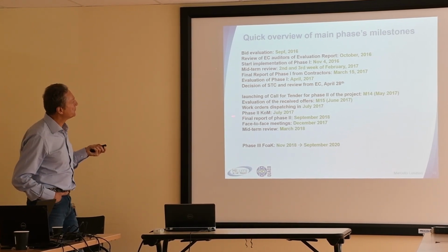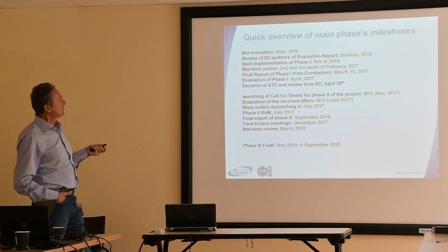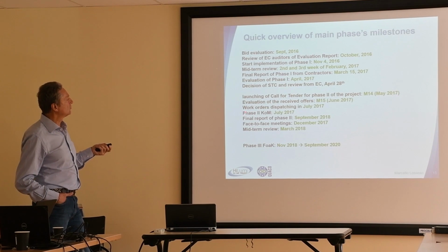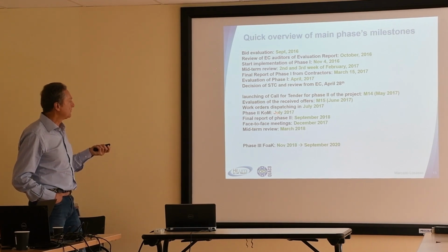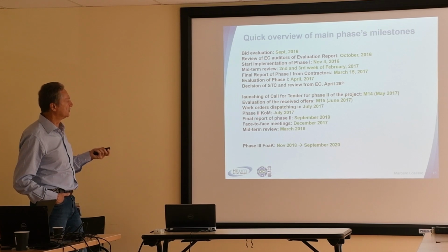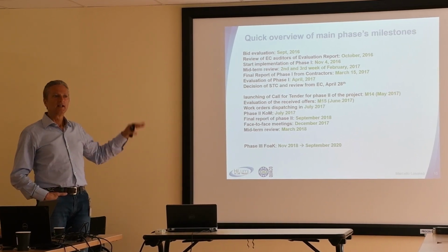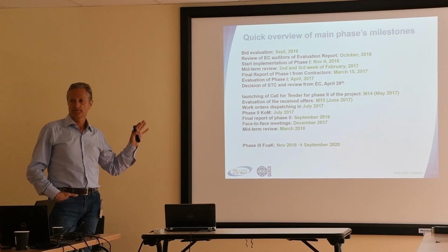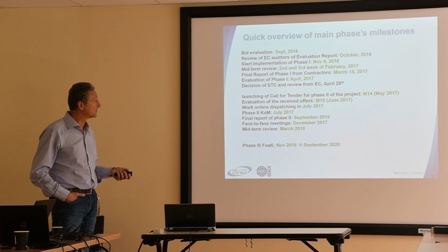Evaluation of the received offers, you will dispatch work orders for phase 2, you will have a kickoff meeting of phase 2, a final report of phase 2, and in the meantime you can have a midterm review or not, and face-to-face meetings, and so on and so forth. And the same for phase 3. So this is more or less the workload that is expected for running a project like this.